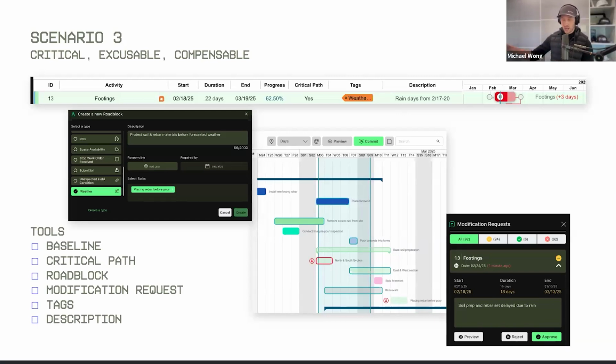You're not just trying to make production work happen just because it's available. That's how you get yourself into trouble of, okay, we had somebody drywall a whole corridor, but then we realized there were 4 different pieces of equipment that had to go in. Now we got to rip some of that drywall off. That's the dance that makes Outbuild's adaptability and the fact that you can plan as a group and plan as a whole network more powerful, because those little things that you miss, they're all costs. They're all delays and reworks, go backs, all these things. So you try to avoid those as much as possible so your team can be successful.